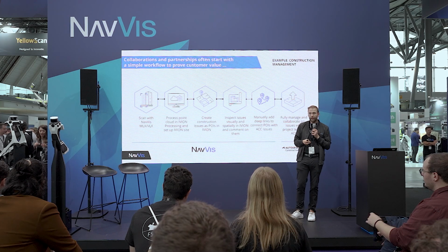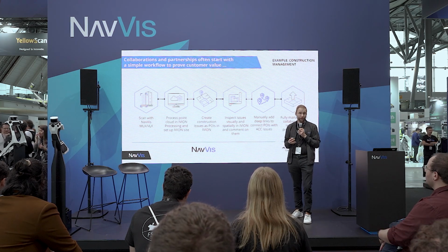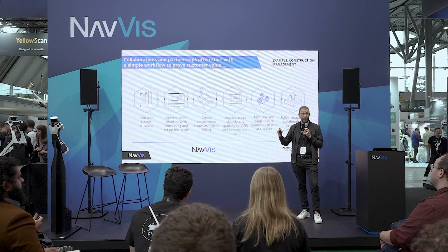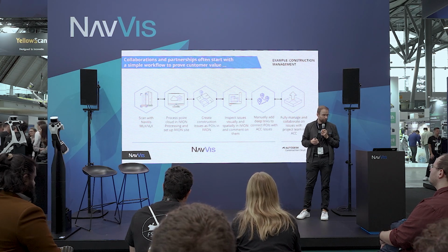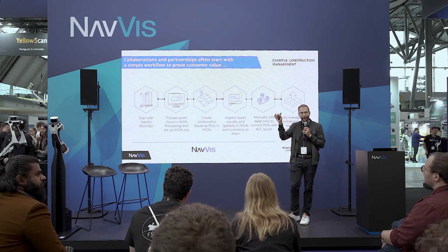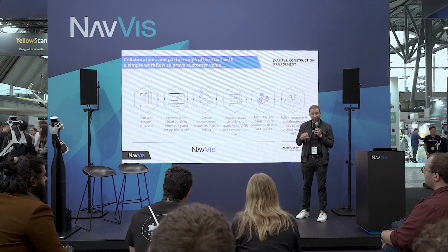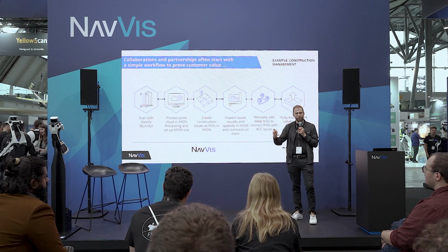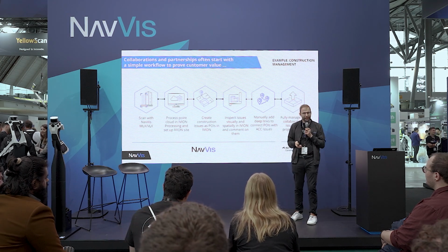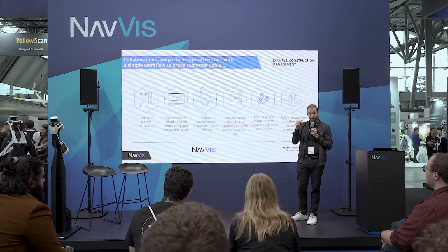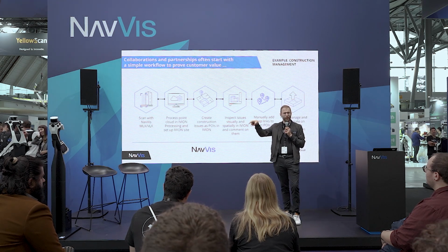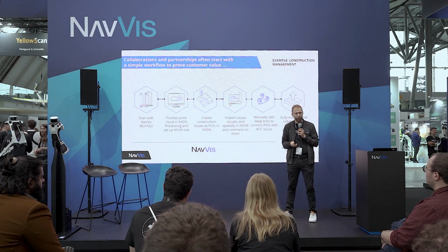One of the workflows that our customers have been constructing themselves is they use IVION, they have the scan data there, they process it, and then they start using our points of interest feature to highlight issues. They will then visually explore them, share them with other people, decide what to do about that particular issue, and then sometimes create deep links from the point of interest and put it in the description and link to an issue, say in Autodesk Construction Cloud.